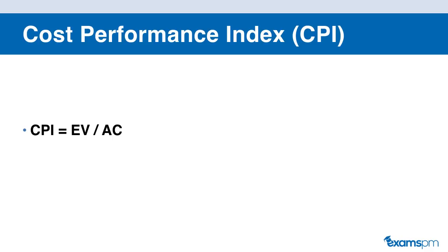So one project may have a cost variance of negative 1,000, another project may have a cost variance of plus 1 million, and because these two projects are on different scales, but they're all under your portfolio. So what you want to do in this case is compute the cost performance index, so it allows you to understand how much you're over or under budget in a percentage format, so you can compare different projects of different sizes across your portfolio.